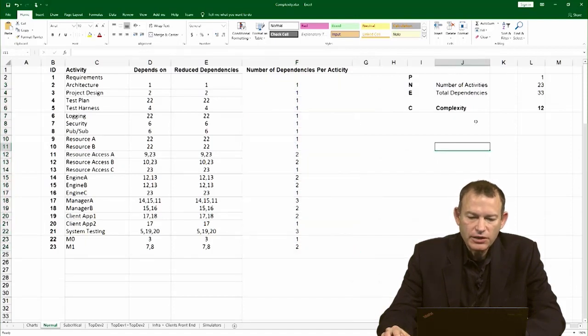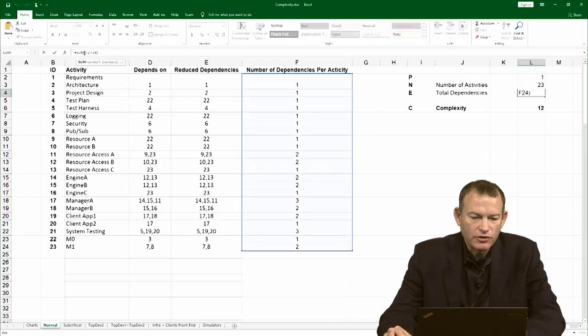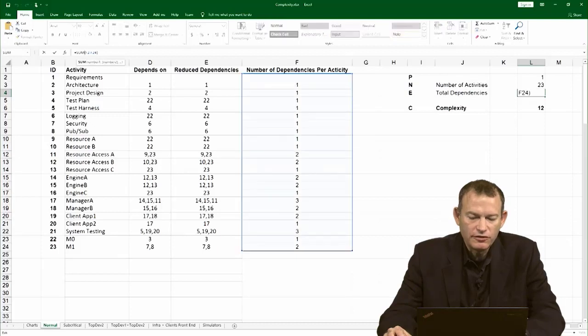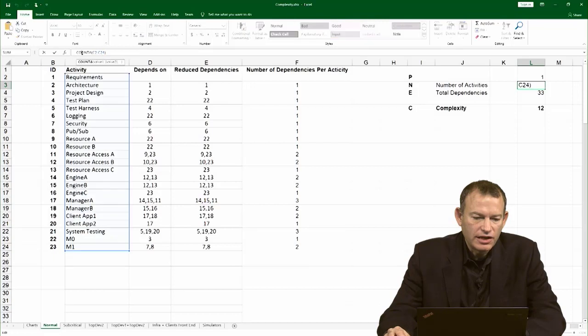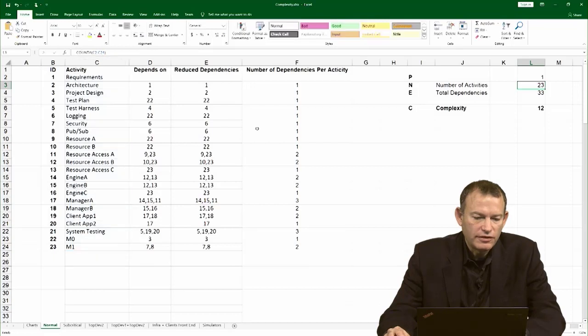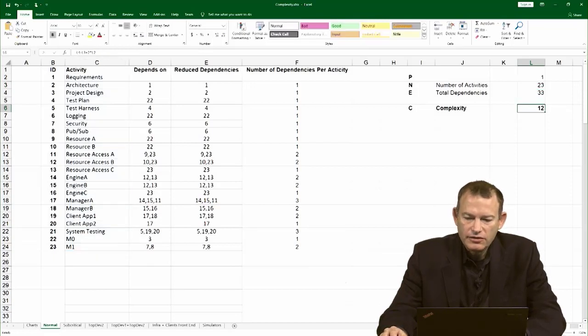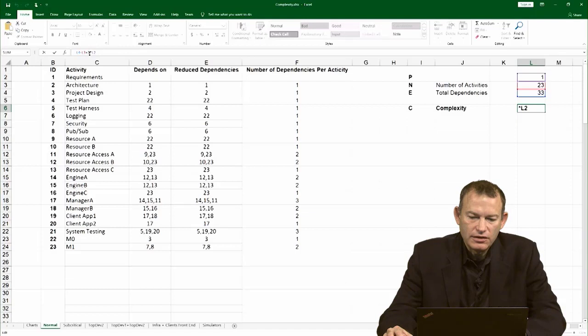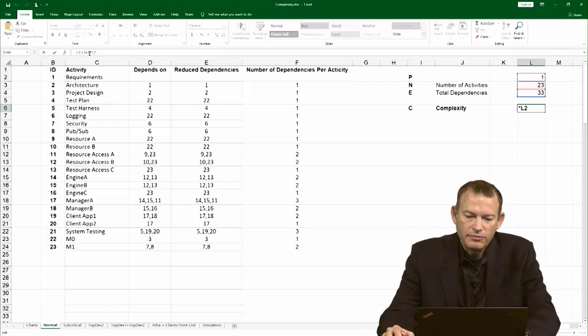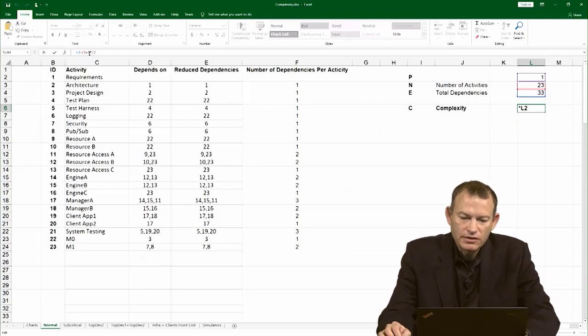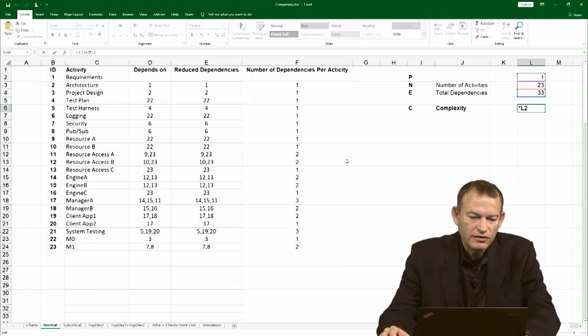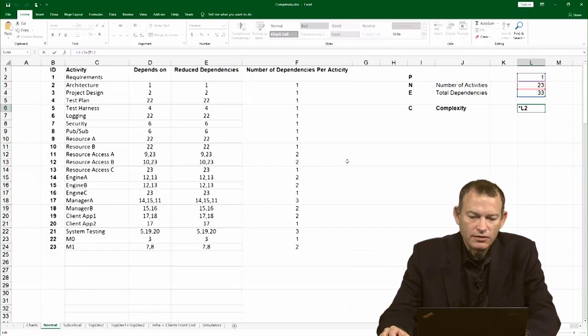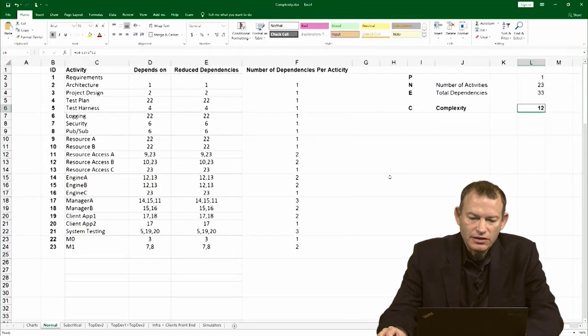Once we have that, we can actually find the total number of dependencies in the project, which is just the sum of these activities. And of course, the number of activities is just the count of activities in the project. The rest is a simple Excel formula that takes the number of dependencies, subtracts the number of activities and adds two times the number of parts. But in this case, it's just one big network. And so, the complexity in this project is 12.